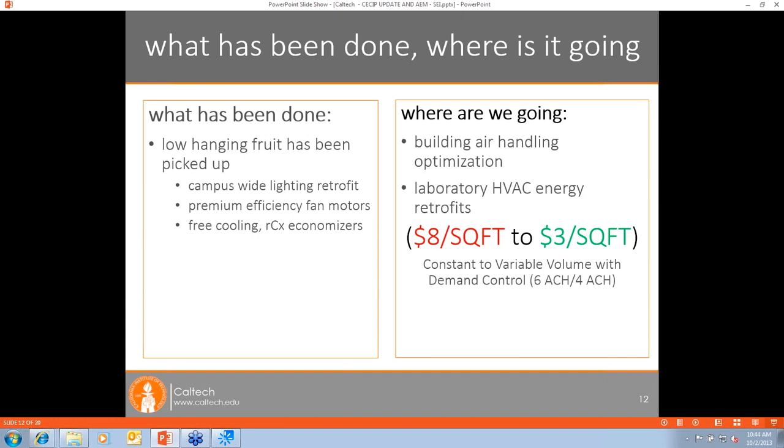So if I know that in quarter 2 we're going to do a lab rehab and cut out electricity starting in that quarter, I budget that we're not going to need that electricity in the model. So it's very schedule dependent, but it's also what allows us to be hyper accurate with the forecast. This isn't just us looking at last year's energy and saying we're going to be 2% more because we're going to grow by some normalized growth number. This includes factors from energy modeling and project scheduling that include future energy reduction.